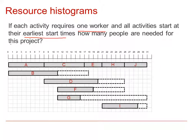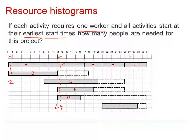If we look at this Gantt chart, we can just look on each day at the activities that take place. For example, this here represents day 1 and 2 workers are required on day 1. This here represents day 2, and if we look down at day 2 we can see that we need 1, 2, 3, 4 workers. And then if we look over here at day 28 we can see that we require 2 workers.